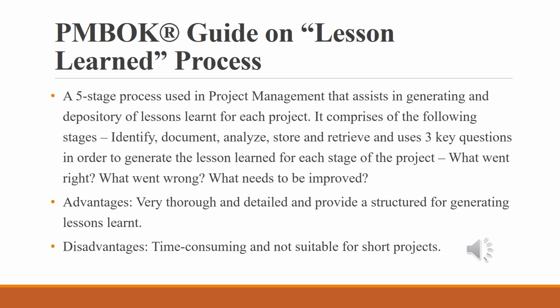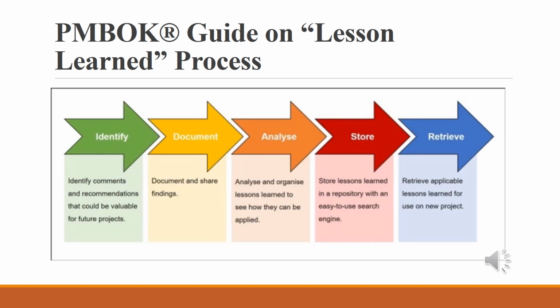So let's have a look at the next slide. This is how the PMBOK lessons learned process looks like. In comparison to the GIBS reflective cycle, the PMBOK focuses on 2 more steps, which are the last 2 steps, store and retrieve. Why do they prescribe that? It is because they want to facilitate organizational learning.